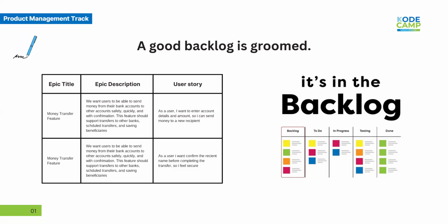Some common mistakes I've seen in too many teams, that are wrong: let's say someone creates the backlog in 1 week. At the time, it's clean, it's neat, it's very well color coded. It makes sense. But for the next 6 weeks, nobody touches it. It becomes stale. Old stories are still at the top. New ideas are just scattered around in other places like WhatsApp groups or communication channels and not on the backlog.